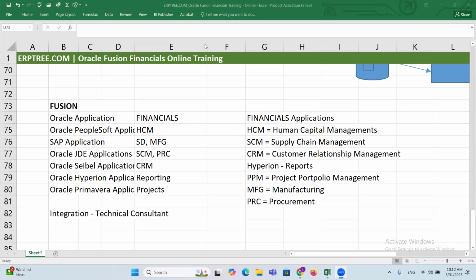If you think you cannot keep everything in your head, keep all the questions in a spreadsheet. And nicely, you can tell the client, these are the questions we are expecting answers from you, by releasing those questions to the client, which we call questionnaires. When you ask these questions instantly in the meeting, they may check their pockets, right? They cannot answer all the time. That is the reason to give a heads up.